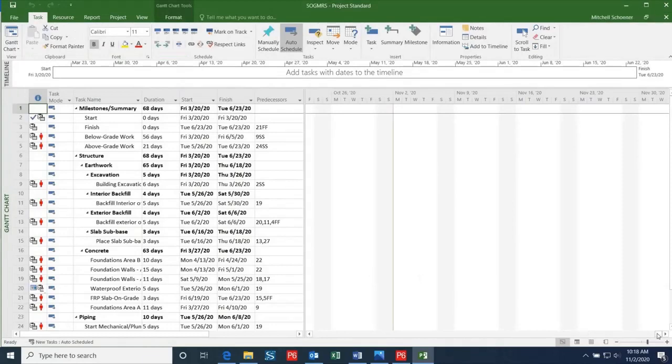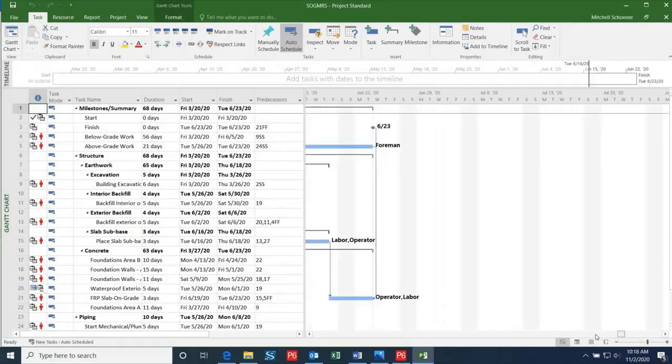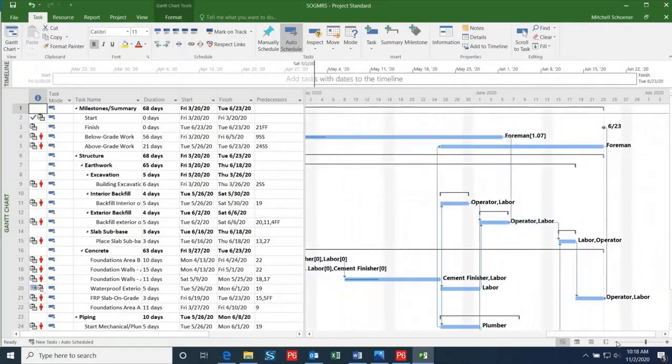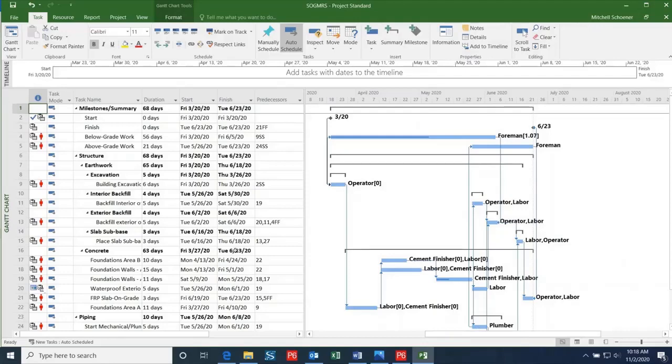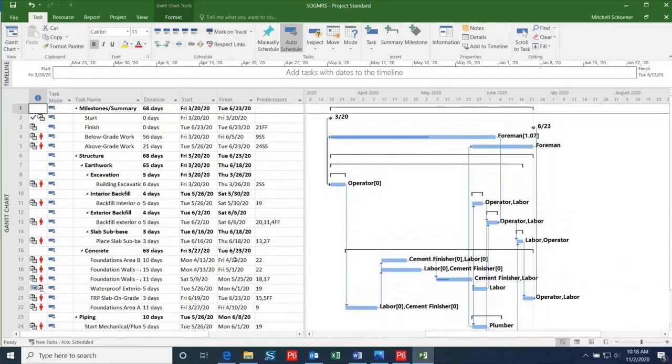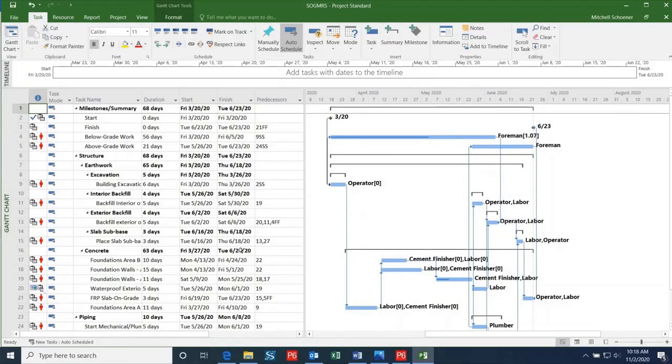One thing to keep an eye out for is that not everything may line up exactly how you had it in P6. Unfortunately, this is the biggest drawback associated with converting a P6 file to a project file. Microsoft Project will pull certain information or not include some information from the P6 file that can affect the dates on the schedule.